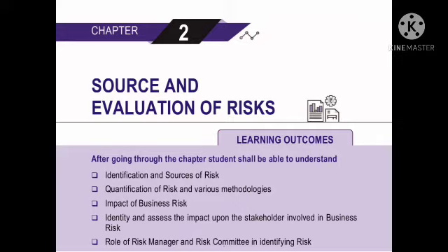8. Bow tie analysis. There is a saying that a picture is worth 1,000 words, and this method is a perfect example of this. Bow tie analysis is a diagrammatic way of describing, linking, and analyzing the pathways of a risk from causes to effects or consequences. Unlike the risk register, there are no numbers in this analysis, i.e., there is no risk or control evaluation involved.